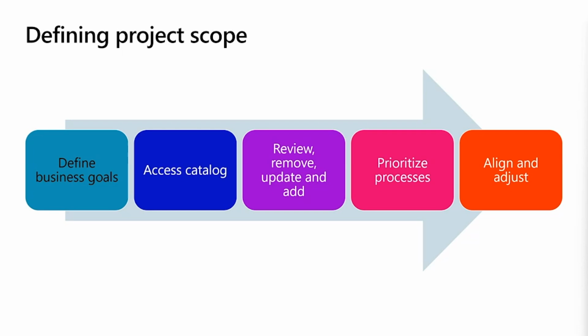The next step in the process is to prioritize. The prioritization process is important for several reasons. Here, we want to identify critical business processes that are essential for the success of the project. So this is not only where we're going to identify our minimum viable product, or MVP, for a particular phase of your project, but it's also where we can identify things that are nice to have. You'll also want to use the prioritization process as an opportunity to think about how we take the processes and split them up into the phases that we're going to implement.